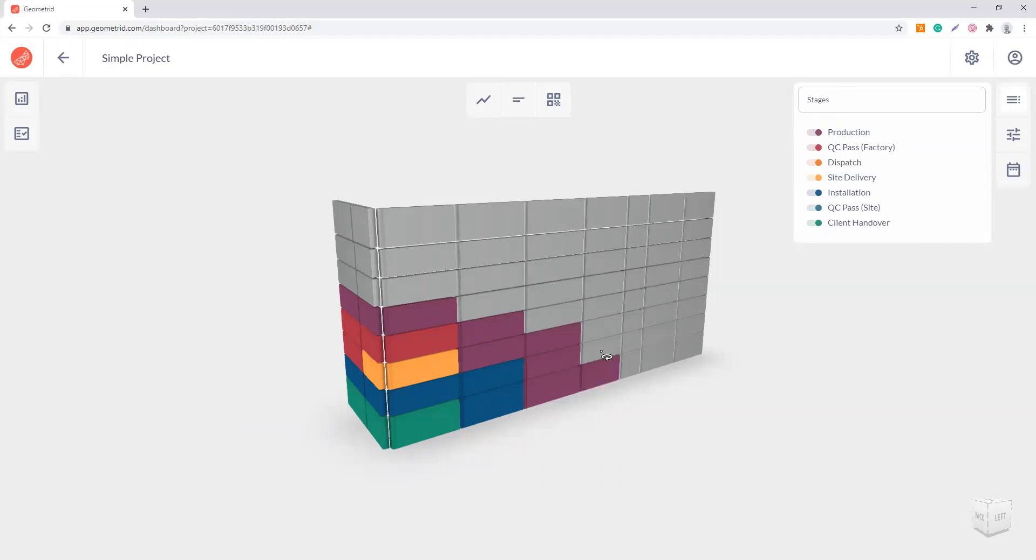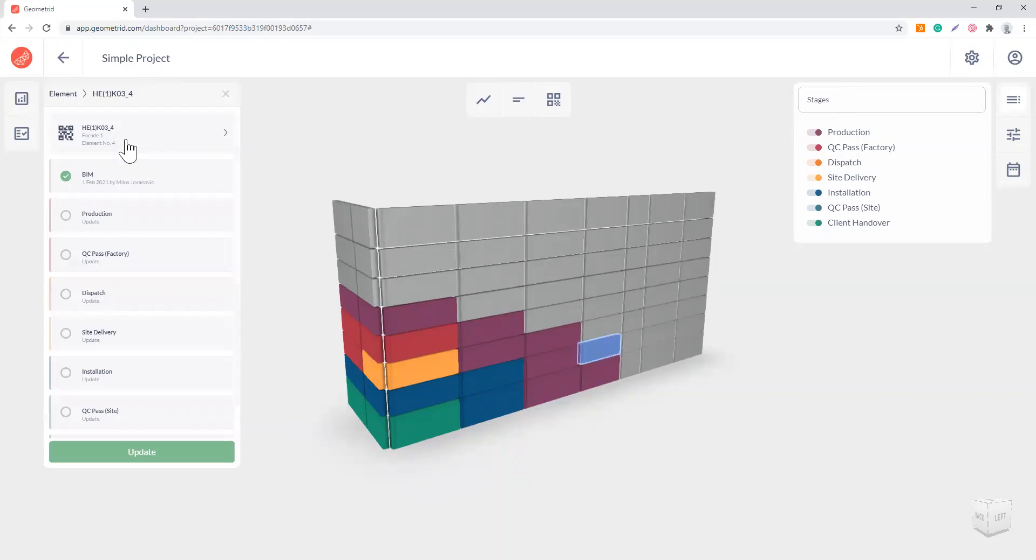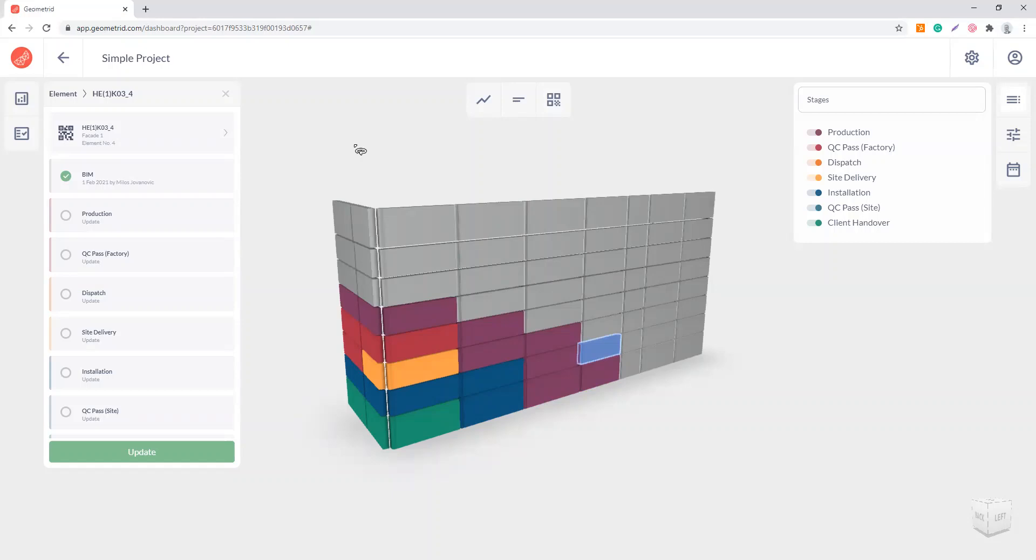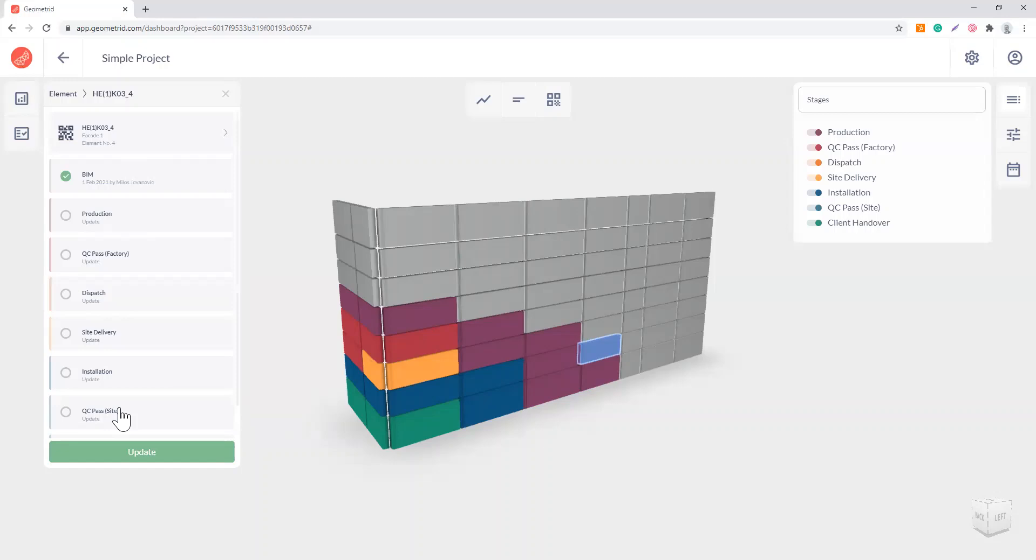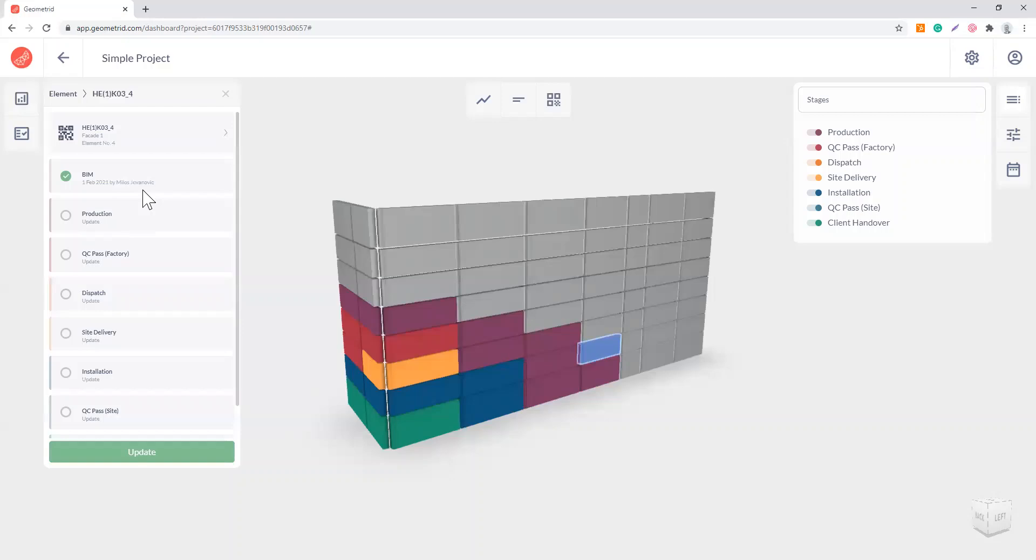Since we have assigned the QR codes automatically to every building element, once you download these codes from here and pass on to the suppliers to print and paste on the building elements, they can scan the QR code of a particular element. This is the screen that they're going to see on their mobile. Let's say they're assigned to production. Once they press update here or press production, they can update the status of the element. That's all they have to do to update the element status, and they can only update for the stages that they are assigned to. No one in production can update for site delivery, installation unless they have permission to do so. These things we set up on the project setup initially.